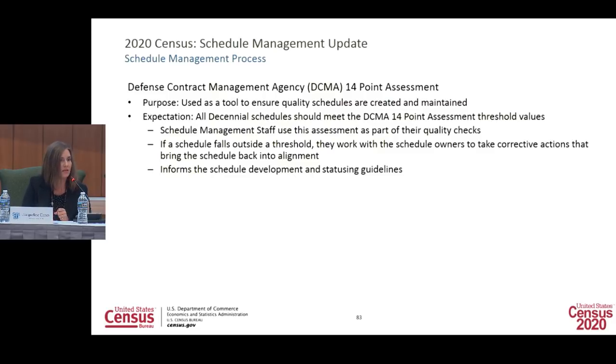We also use the Defense Contract Management Agency, or DCMA, 14-point assessment, as a tool to assess the health of our IMS. It also ensures that we stay within our quality standards, and so we run this every few weeks to ensure that we stay within certain thresholds.